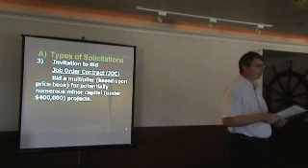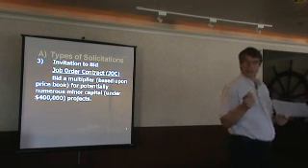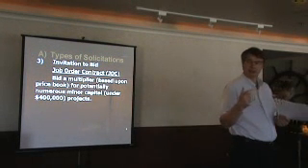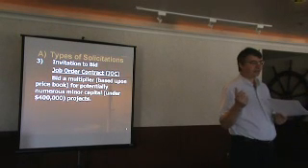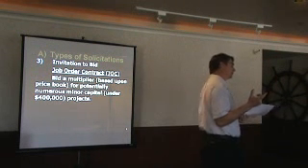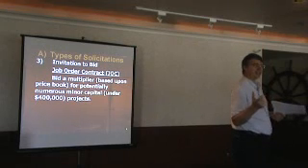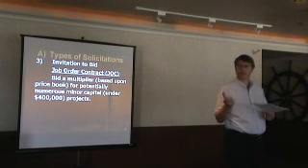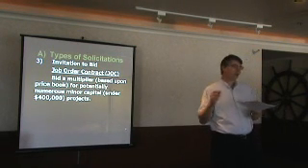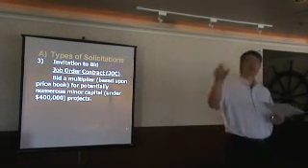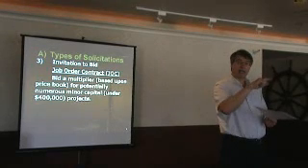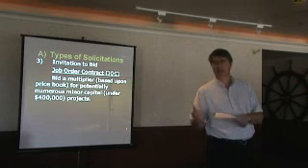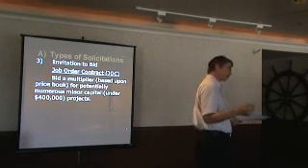JOC contracts are bid as a multiplier. There's a price book, and it's a hefty price book, but it comes out on CD. What you do is you bid a multiplier on that. Before the economic meltdown, we were seeing the multipliers bid out at 1.1 to 1.3 of the price book. So if they said, I'll put in a cover plate for a light switch for $1 in the price book, then the JOC contractor would really do it for $1.10 or $1.30, whatever the multiplier is.